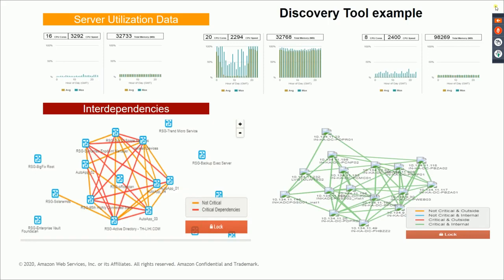And that tool can then suggest the kind of migrations that we can attempt, or the kind of server sizes that we can take, for the kind of information that we are feeding. Right. So even though you do not have discovery done, still with information in the form of an Excel file or a CSV export from a CMDB, you can still go ahead and do the analysis by using the MPA tool. And it also helps you in doing the move group analysis. So it shows you all the dependencies. It shows you how many connections there are from one application to another. On the basis of that, you will be able to define the move groups. And it also gives you a move group planning interface where you can actually put the move groups into a sort of project plan.